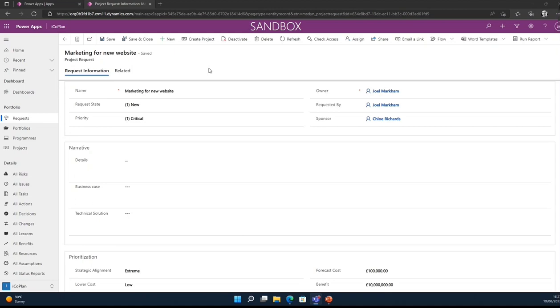Much appreciated. And some of our customers will take this through a business process flow, and I'll show you what that means in a minute. But it's basically a series of bullseyes across the top. So you could say this idea has been submitted, this idea has now been reviewed, and you could promote it through to the next stage, just like a life cycle in a project. And you can go to review and have automation in there as well. So it goes through a proper life cycle as a request in its own right. And only when it gets to the end of that life cycle does that create project button become available and appear, and the portfolio management team, PMO office or administrators of the system are able to promote that to a project.